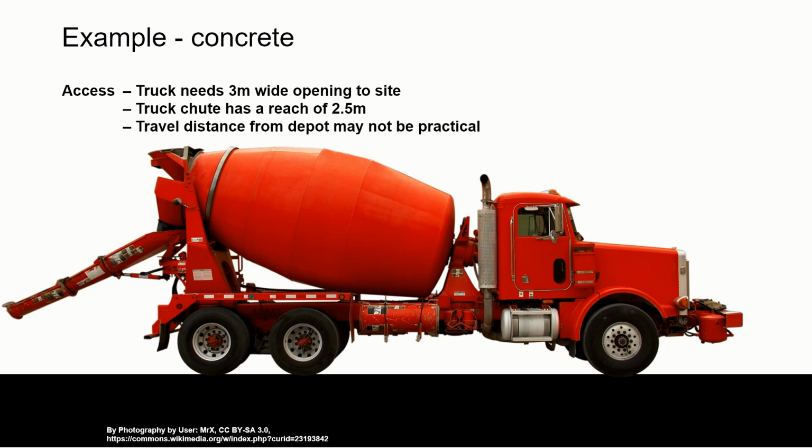On a normal site, if they can get close to where it needs to go, it's a very short distance to be able to drop the concrete into a barrow and somebody to move it there. If it's a long distance away from the actual site, then you may have to spend additional money getting pumped concrete, which the truck will come along with specialist equipment on the back.